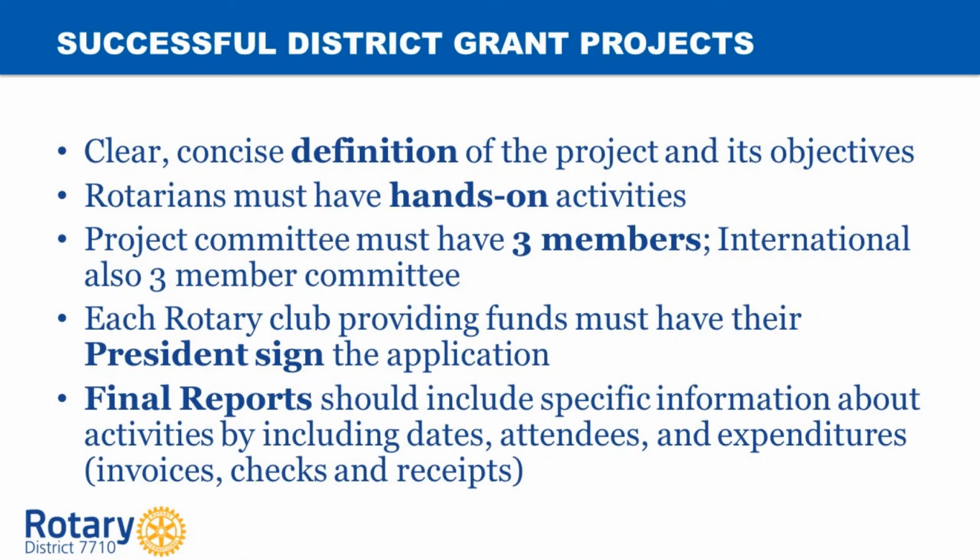A final report will be required after the grant is completed. That will require very specific information about what was actually done, what dates, who attended, what expenditures, supported by invoices, checks, and receipts, etc. That report gets reviewed by the grants committee and may get audited by a group of past district governors to make sure that we are doing everything correctly.